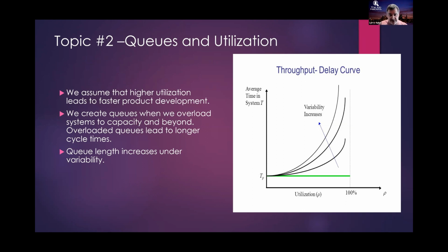But regardless, you have to understand, if you want more things to move through the system, you need to take things out of the system. So if you want traffic to flow faster, what do you do? You either add more servers, queuing theory, or you have to take traffic off of the system. There's no other way around it, right?